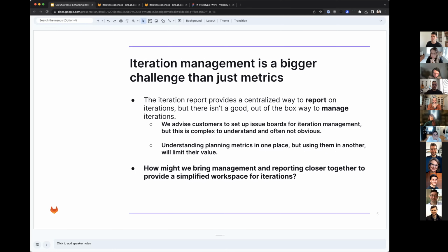But what we started to realize is, what do I do with that information? Okay, so we can put velocity in there. It's just a number. It's not that hard to put on the page, but what does it enable you to do, and why are people using it? What they're trying to do is plan their next sprint, or the next 3 sprints, or whatever they're lining up. And this is a way to see, okay, should I add another story? Do I have too many? Do I need to move some to the next one? How do my next 3 all line up?